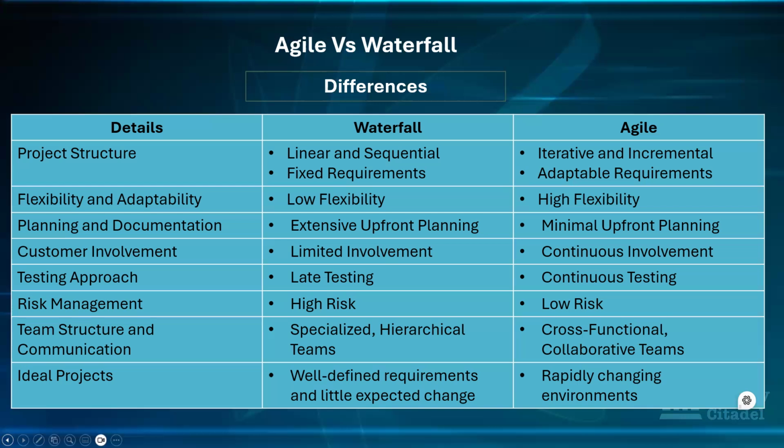Waterfall's highlight is not flexibility and adaptability. That belongs to agile. Okay, so waterfall. Let's assume that there's a request for a new feature after the design stage of a website project. The flexibility is so low. Once the contract is underway, it's difficult and costly to go back and change things.